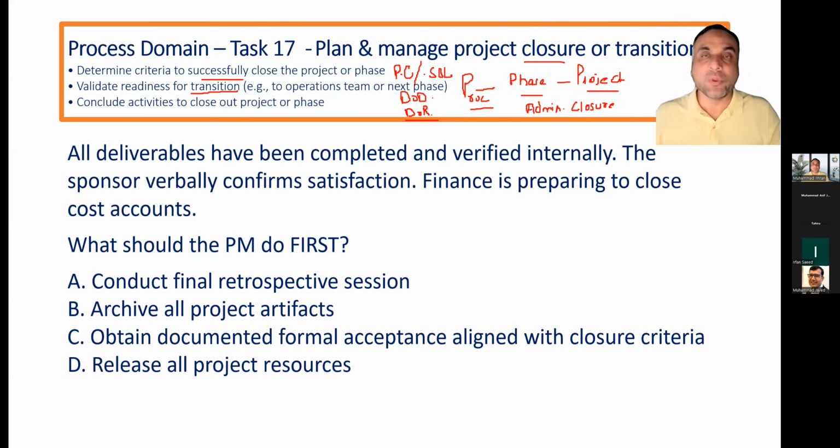When you are going to make the transition from project to operations, what you need to ensure, whom you need to engage, what preemptive actions have to be done. Will there be training provided? Will you run it for a while and then transition it? Like we call it build, own, operate, and transfer. So where will these strategies be written? In the contracts.